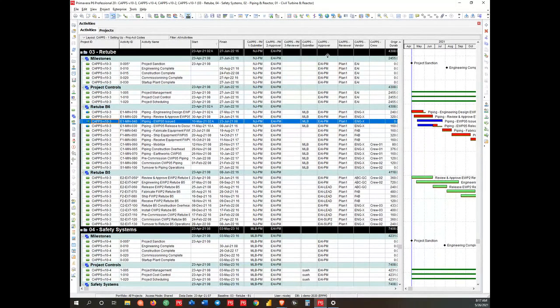Now, I can go deeper. I don't have to just use one code. I can have multi-layer coding to allow me to filter and divvy up who's going to do the updating. So I can go into more detail. So for example, I might decide to give my vendor access to CAPPS. So they can do their updates in CAPPS, very lightweight. They don't need to be a P6 expert to do them. And they can have a reviewer, an approver, or I can send them straight into P6.